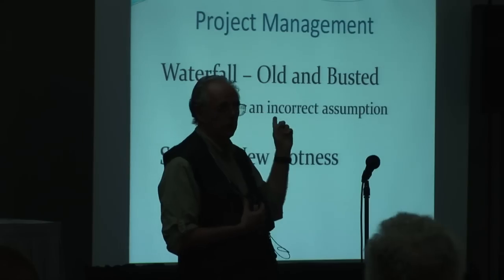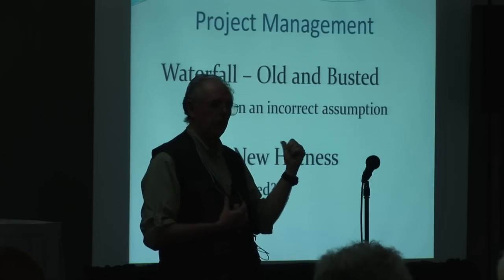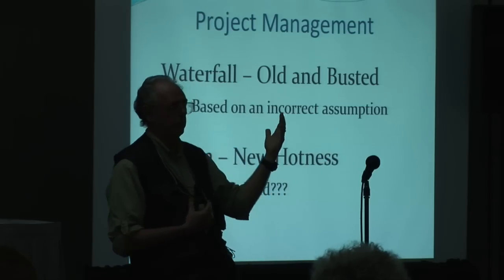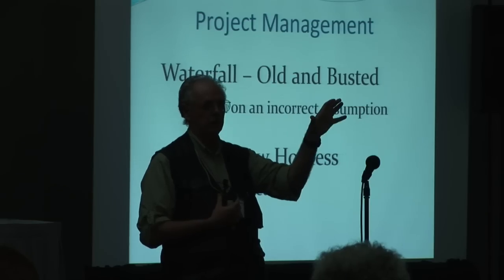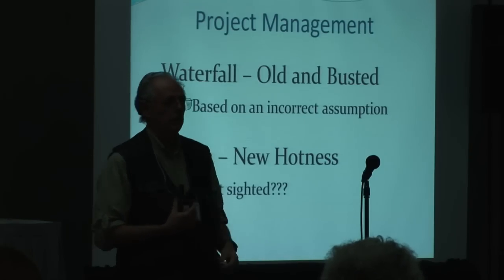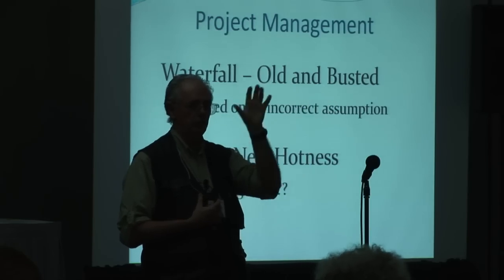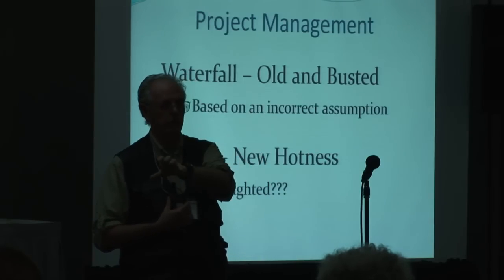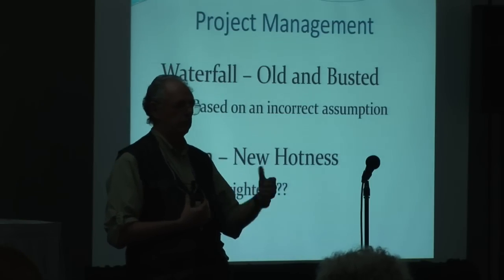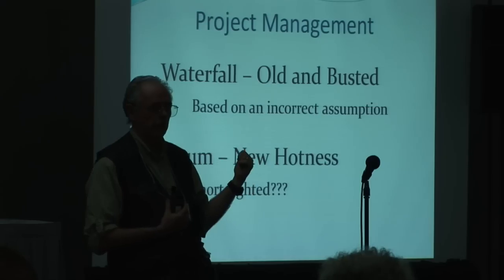So the waterfall, first of all, it was already obsolete when it came out. It had assumptions that kind of fit for some industries, but not for us. There are 2 waterfall concepts, in case you haven't been keeping up. The original waterfall was planning, and then design, and when you're done with the design, you do development, and then you do testing, and then you do delivery. That was all based on the assumption that after planning you can understand exactly what needs to be done, and then you design to that, and when you've got the design done, you just develop it. If you're building bridges, or some software things like an ATM system, where you can write a specification and there is a need that you have to fill, then maybe this works, but even there it had problems.